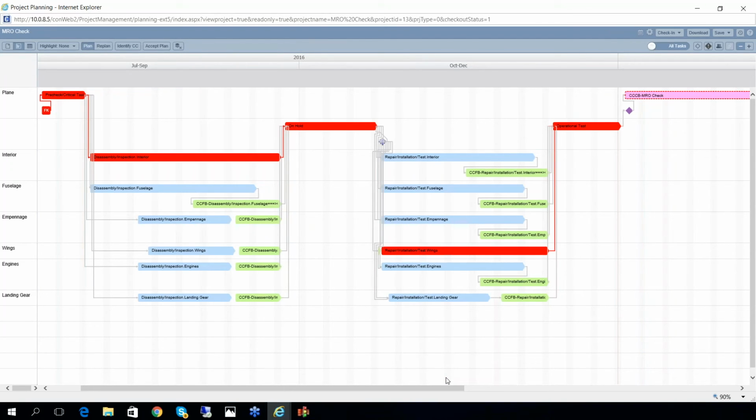So again, what you will see is the critical path is comprised of only 5 tasks. And by definition, this critical path is going to be very stable. And because this critical path is stable, the priorities that you're going to get on a day-to-day basis are going to be stable. And stable priorities, by the way, are important if you want to reduce the amount of multitasking in your organization. If your critical path is changing every day, it means the task priorities are changing every day, and it means you are actually forcing people to multitask. But if you can hold the critical path stable, that means you can hold the priorities stable, and that means you can allow people to focus and finish what they're working on.